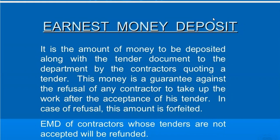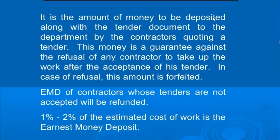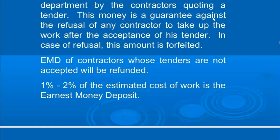This money is guaranteed against the refusal of any contractor — if anyone cannot or refuses to complete the contract after acceptance. So what happens in that case? We have to take the amount of money on the basis of the deposit. If the work is completed satisfactorily, then the amount of money will be refunded. If not, it will be forfeited.